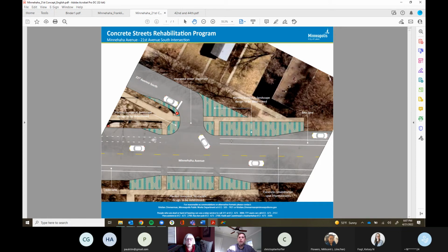The bike lanes as they are today, they will remain, they won't change. They'll just have some additional protections of shortening up that exposure to any turning vehicles. And then on the southbound travel lane, we are looking at adding in 2 of our crossings with ADA ramps, and then also extending the curb out into the existing parking lane. We are working with an adjacent property owner there that has some larger vehicles that operate at his site. There are 2 existing curb cuts there, so we're working with them to try and work out a plan that they can have their deliveries either done through the alley or off of 24th or 22nd Streets that are nearby. And so that way we can eliminate these curb cuts to Minnehaha, and we can get these ADA ramps and bump outs in place.